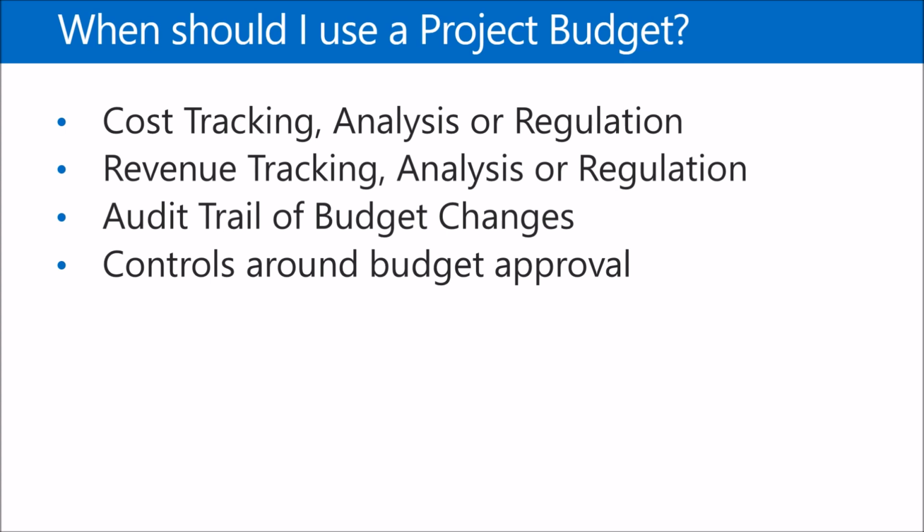The next reason to use budgets would be if you need an audit trail of your budget changes. Basically, every time you create an original budget or revise the budget, the system's tracking that information. And there's also workflow controls around budget approval. So you don't just create a budget and allow it to go through. It actually has to go through an approval process. So these are just a few of the reasons why to use project budgeting.